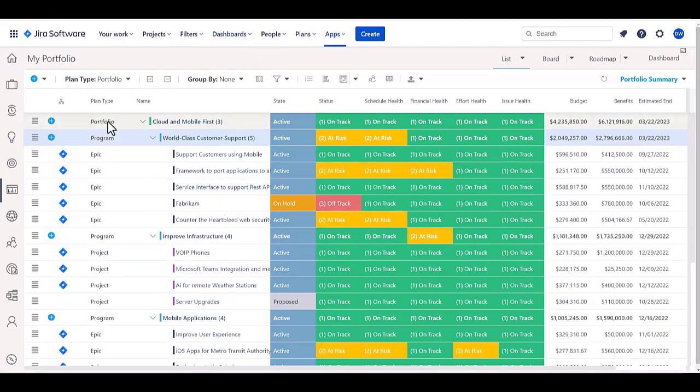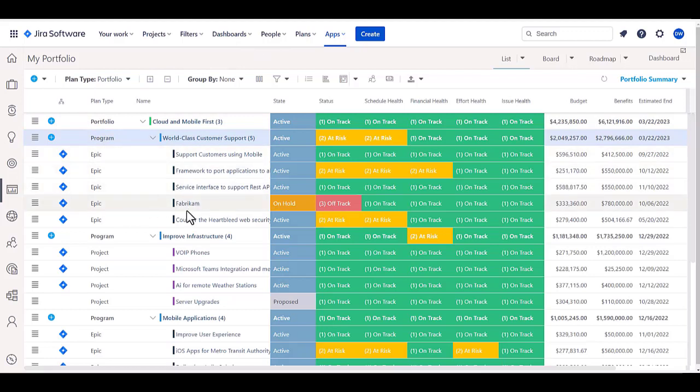In this case, we have portfolios with programs within them, and then the epics are coming from Jira itself and are the portfolio items that we're managing from a portfolio management perspective.